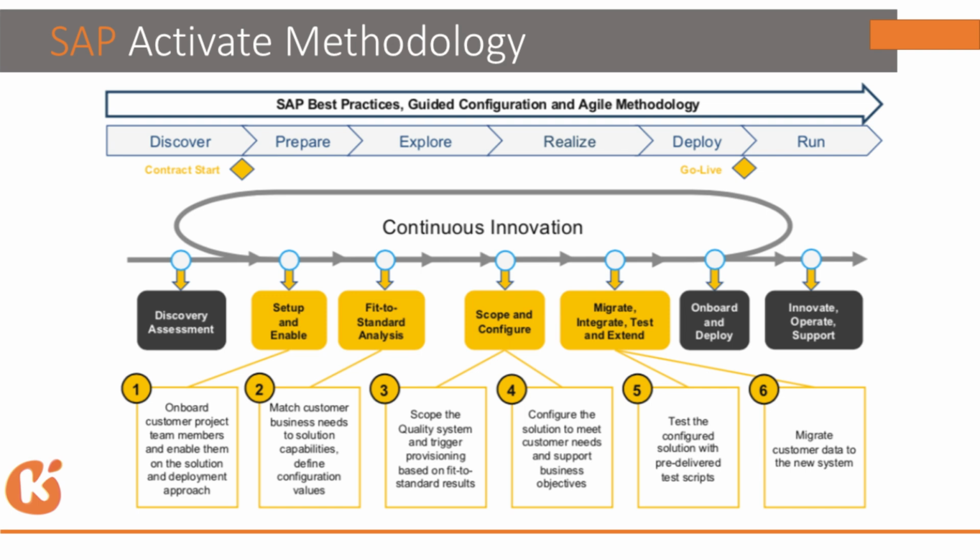So go live is nothing but giving your product to the client, where the client can use that system thoroughly for the daily activities. This is called the overall process involved in the SAP Activate Methodology. There are just 4 phases. Each phase describes the respective modeling: prepare, explore, realize, deploy. It is very sequential.